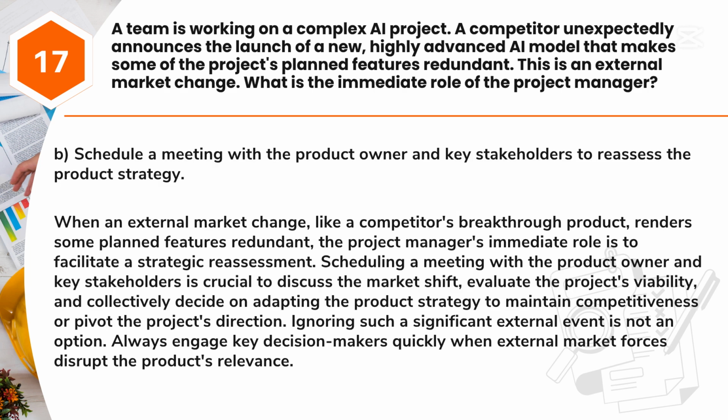Answer: B. Schedule a meeting with the product owner and key stakeholders to reassess the product strategy. When an external market change, like a competitor's breakthrough product, renders some planned features redundant, the project manager's immediate role is to facilitate a strategic reassessment. Scheduling a meeting with the product owner and key stakeholders is crucial to discuss the market shift, evaluate the project's viability, and collectively decide on adapting the product strategy to maintain competitiveness or pivot the project's direction.